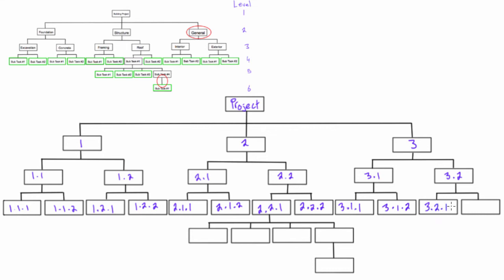And this is .1 because this is the first one, and then the next one would simply be 3.2.2. Alright, so now we're going to drop down to level five. We'll carry this down, 2.2.1, so these will all start with 2.2.1.